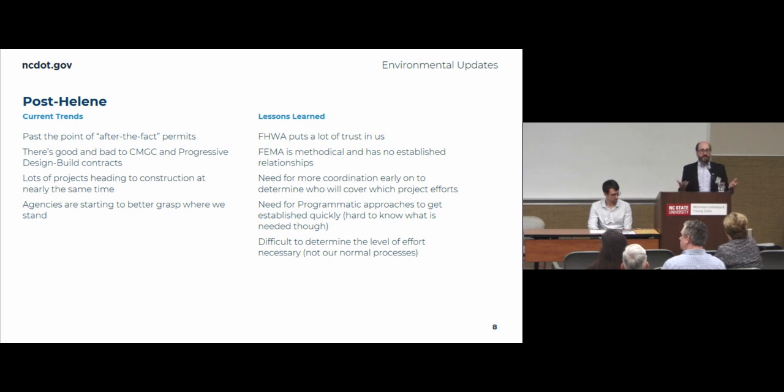I can tell you it's a huge headache from an environmental standpoint to keep track of it all, because we're really never sure what's happening on any given day. But communication is the important part. Knowing what's happening, knowing what's coming next, knowing what's included in work packages, keeping up with permits, and being willing to do phased permitting in a lot of cases, or even iterative permitting where we're permitting one action as part of the project and then we're permitting another action as the work packages roll through. We have to kind of be willing to roll with those punches along the way.